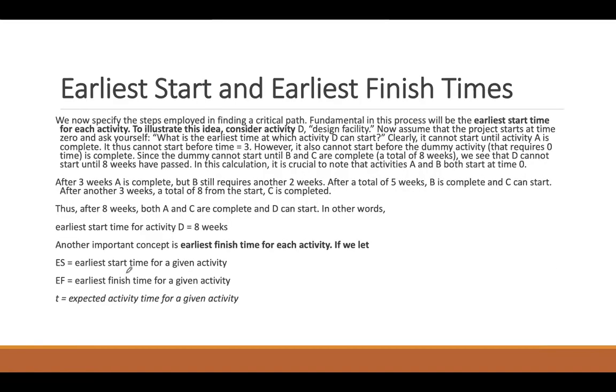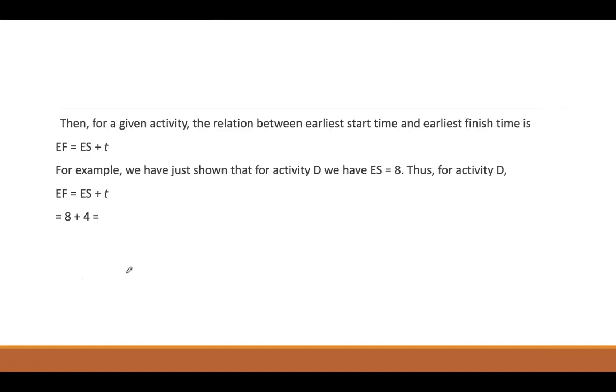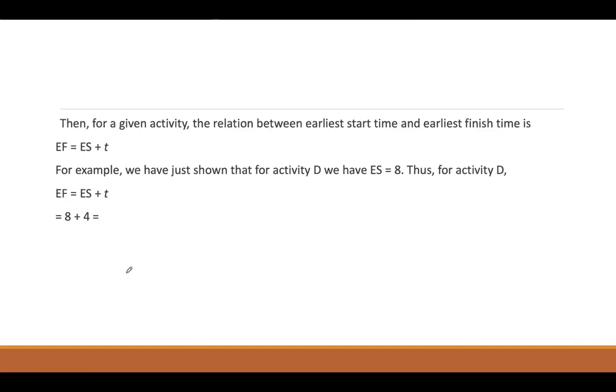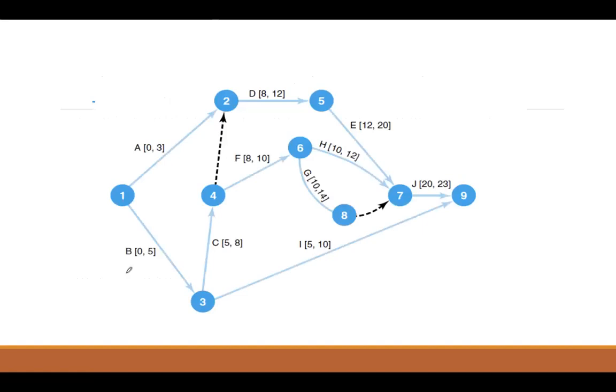For your exam, I told you to note, you can just go with the network diagram. So there are two ways to calculate the critical path method. To understand the critical path method, we need to identify what the critical path is. And what is the critical path? Critical path consists of activities which are critical for the project. Now you'll be wondering, all activities should be completed, so why are only those activities called critical, right? Those activities are called critical because we don't have slack available for them.